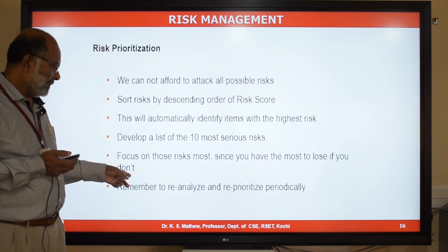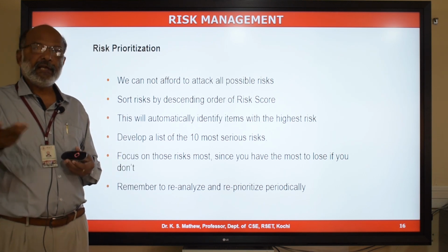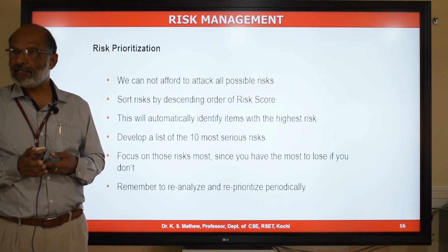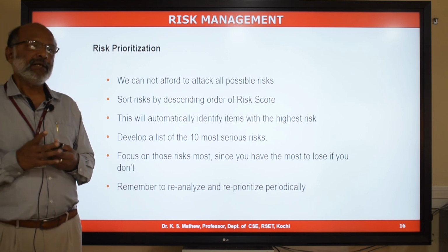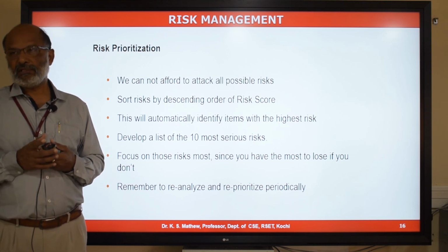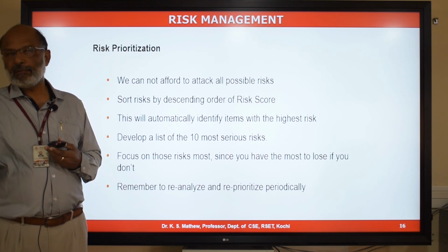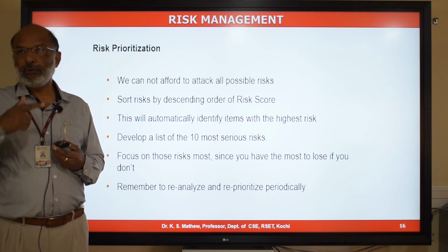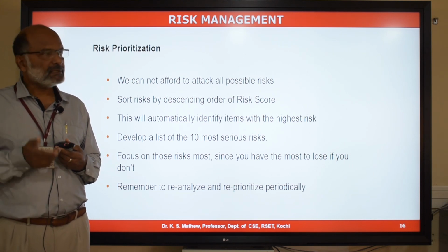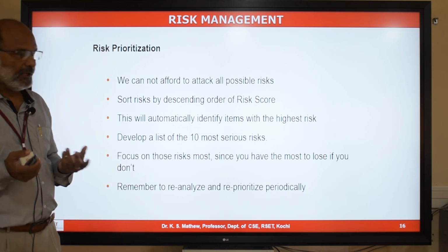And remember to reanalyze and reprioritize periodically, probably every week as part of your project status and progress monitoring, because the probability and impact may change for a risk as we progress in the project. Probability of occurrence may come down, the impact may come down. For some of the risk, impact may go up, probability may also go up. So you need to reanalyze and reprioritize the risk as we progress in the project as part of your project status and monitoring every week.